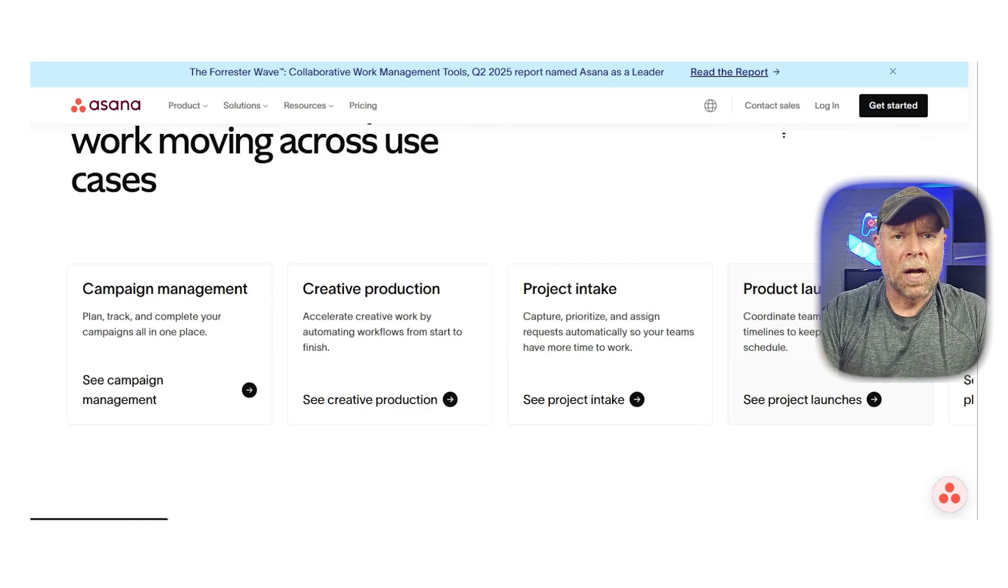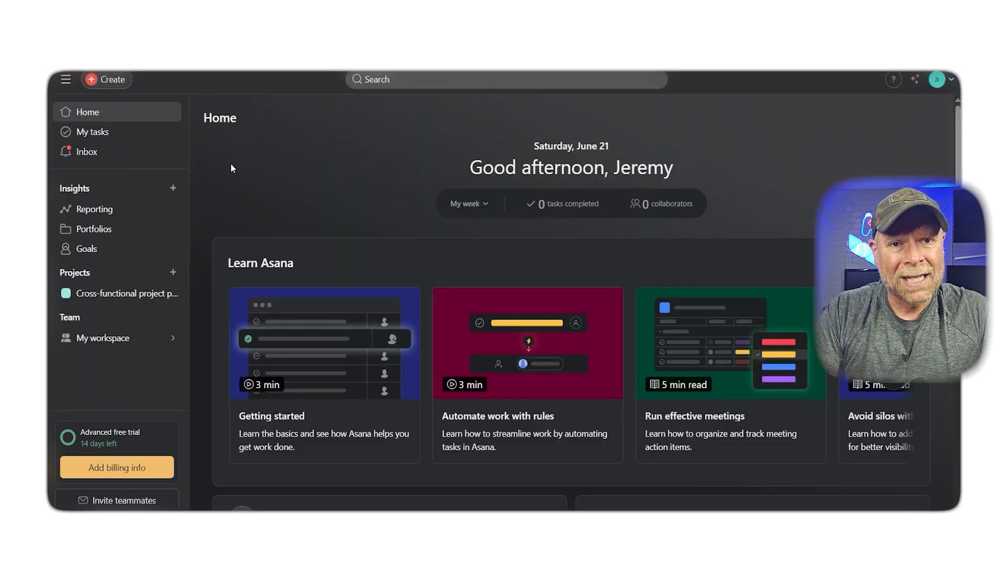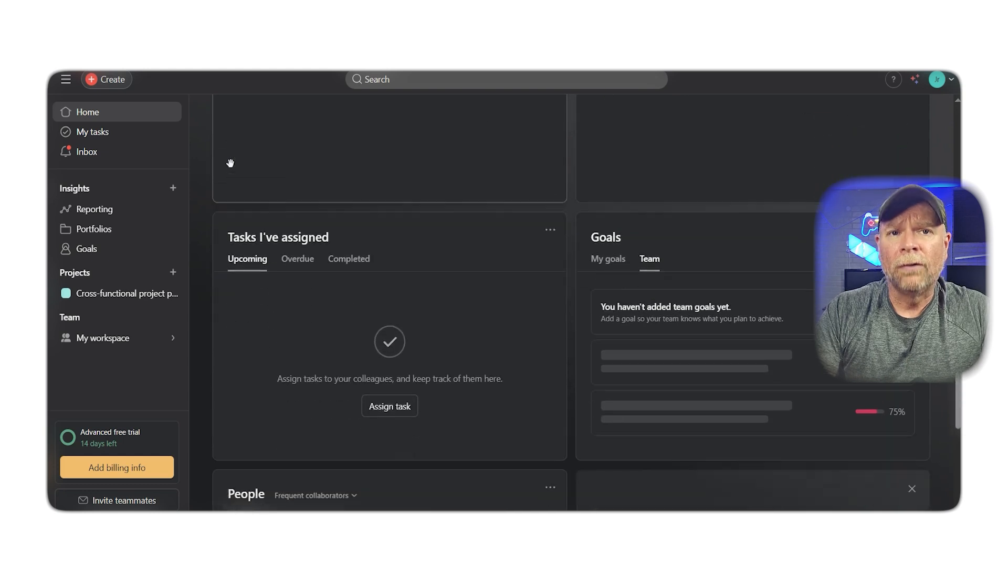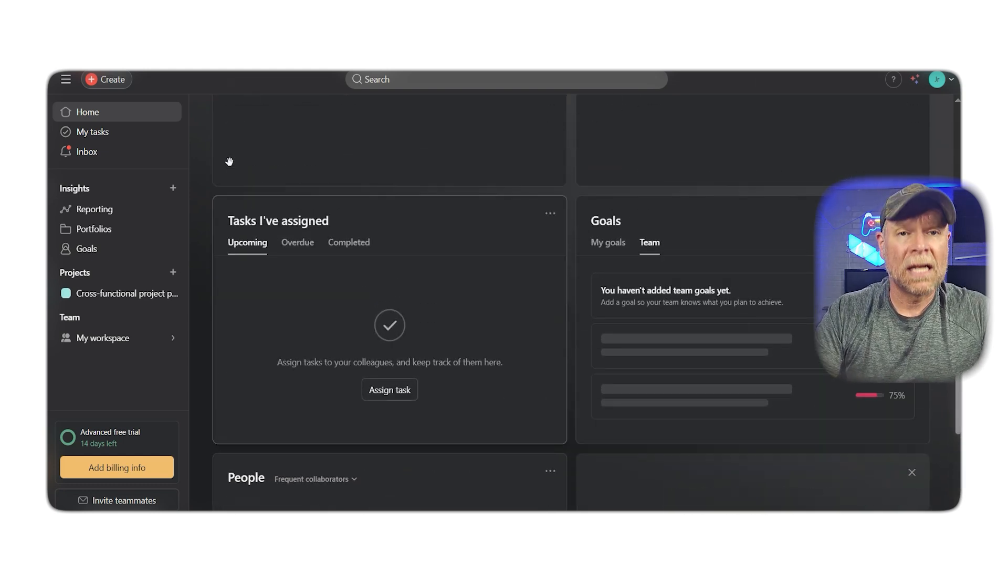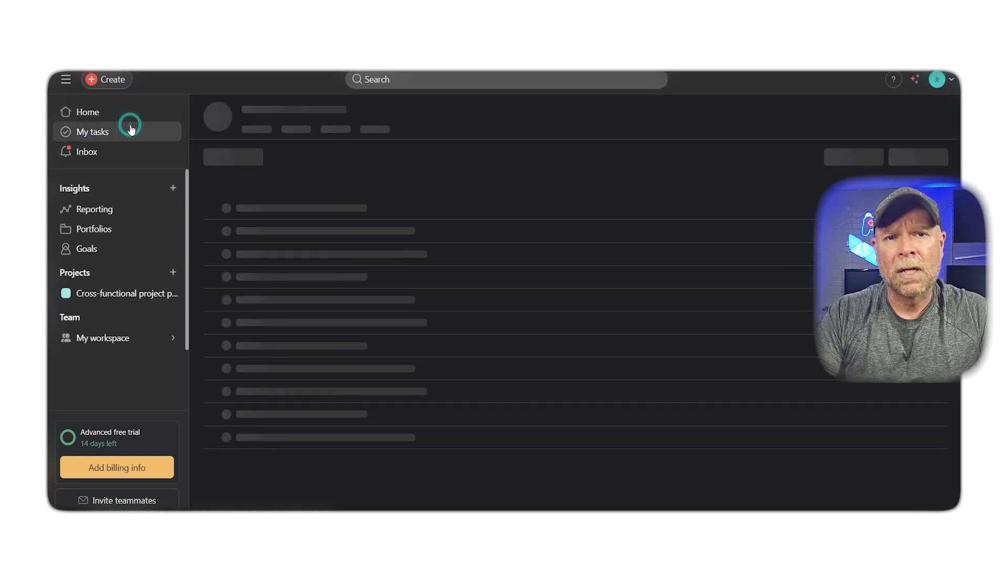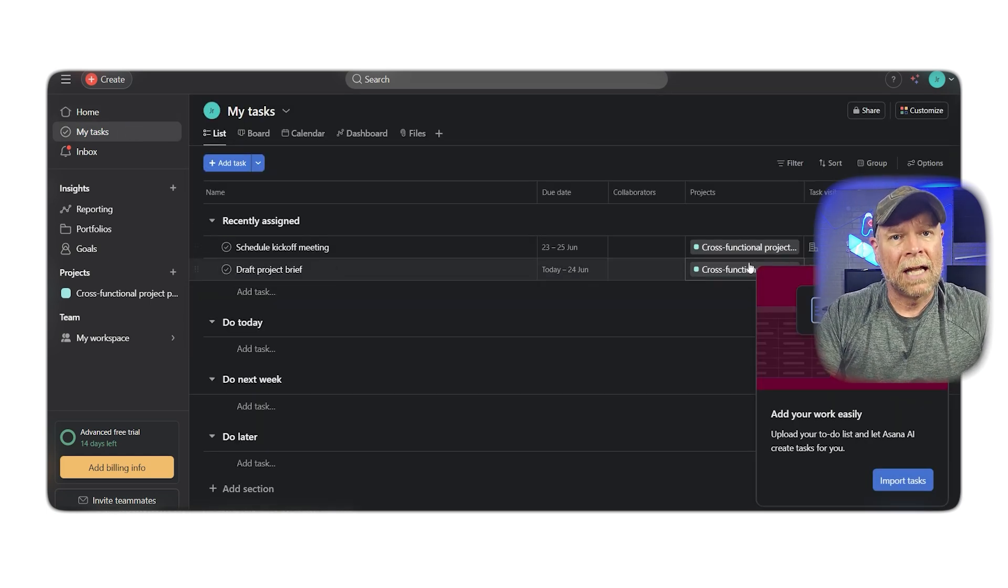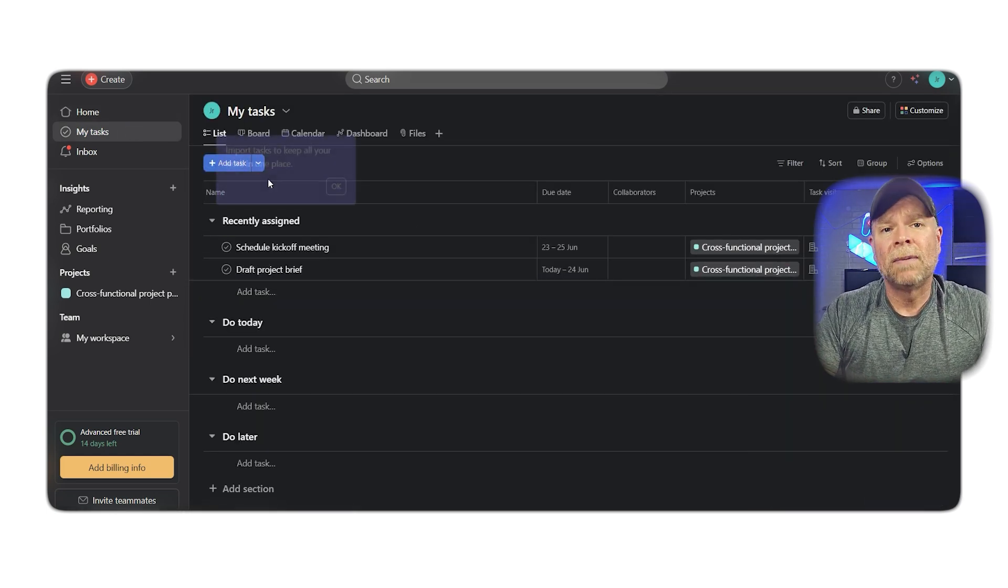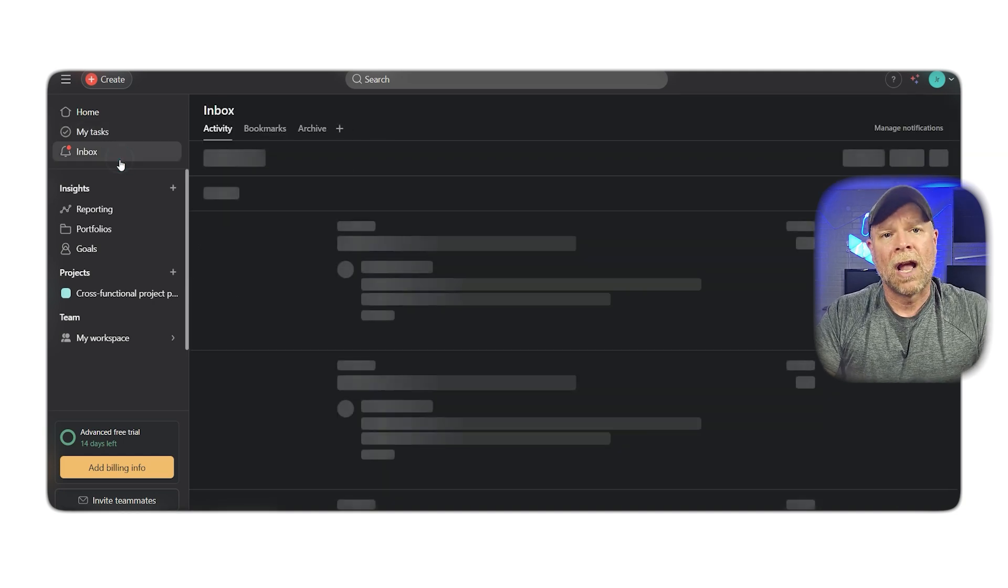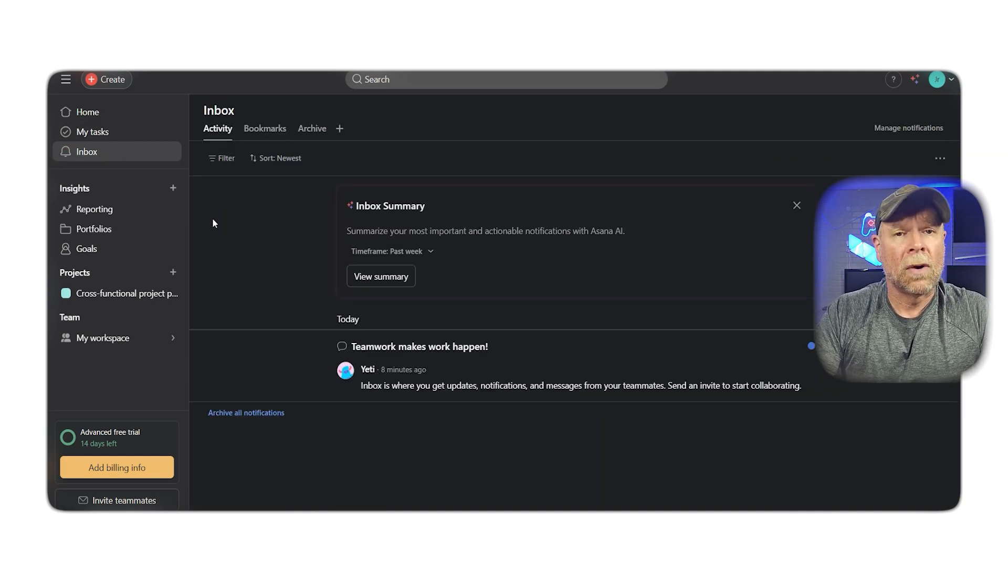Each project can be broken into tasks and subtasks, which makes it perfect for detailing out multi-step workflows. Think of something like writing a blog post. You can have the main task labeled write blog post and subtasks like draft outline, write first draft, review and edit, and so on.